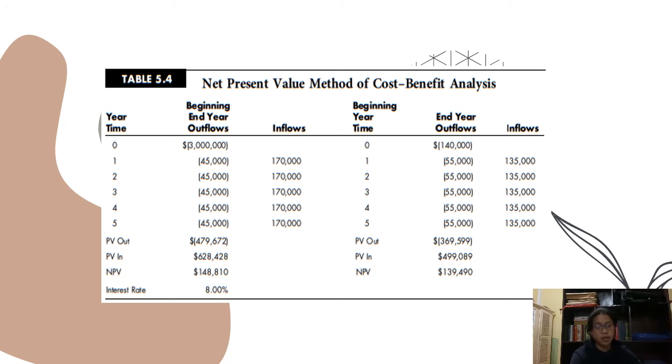Okay, so this table illustrates the net present value method by comparing two competing designs. If costs and tangible benefits alone were being considered, then design A would be selected over design B. However, the value of intangible benefits along with the design feasibility scores must also be factored into the final analysis.